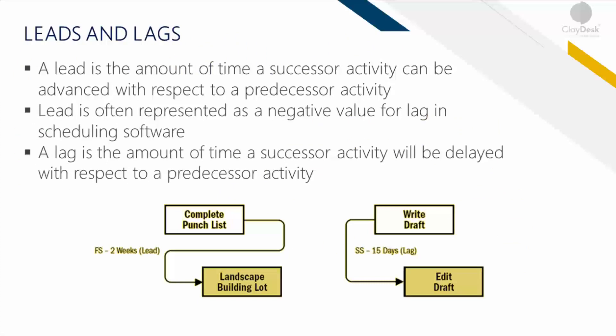The concept of leads and lags: a lead is the amount of time a successor activity can be advanced with respect to the predecessor activity. For example, if you are constructing a new office building, the landscaping could be scheduled to start two weeks prior to the scheduled punch list completion. This would be shown as a Finish-to-Start with a two-week lead time.